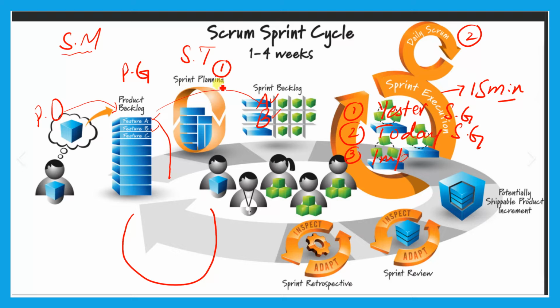So one more thing, that is sprint planning. This event is 8 hours maximum if the sprint is for 1 month. Similarly, the daily scrum meeting is 15 minutes, whether the sprint is for 1 week or 4 weeks, whatever. Right after this, suppose this sprint goal is done, then it means our two items are done. It will add the value to our product goal. In order to complete the product goal, these two items are done, they will add the values. So it means these two items are ready, a potentially shippable product increment, which means they add the value.